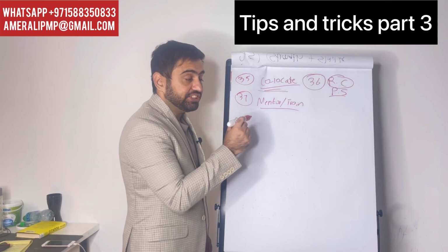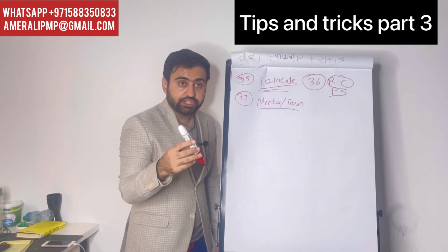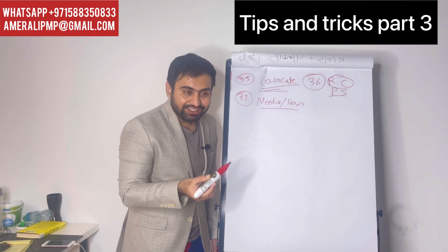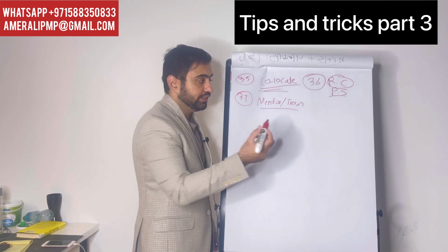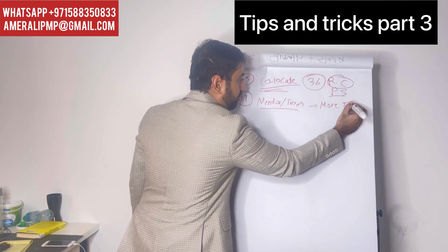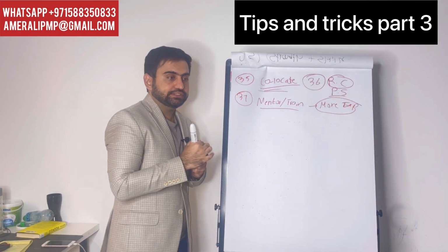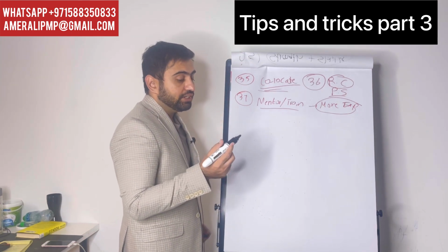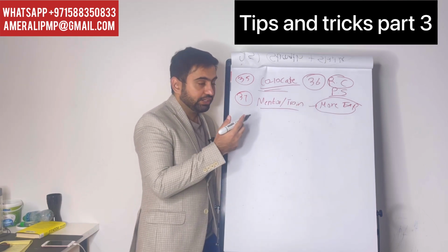But there's a catch here. Let's say the project is running behind schedule and the team member left. What should you do? Should you hire a less experienced team member and mentor him, or hire a more experienced one? In this scenario, we don't want to train him, we want to hire more experience, because at the end of the day, the project is more important than anything else. If you keep training and pampering them, and at the end of the day the project is not successful, you are not successful. So the project is more important when it comes to this.